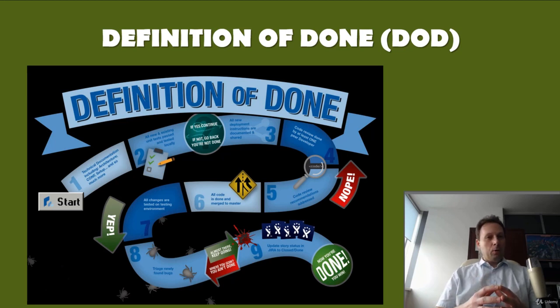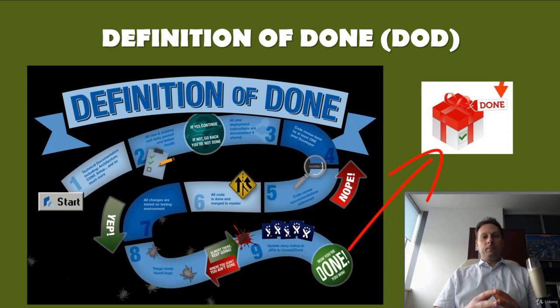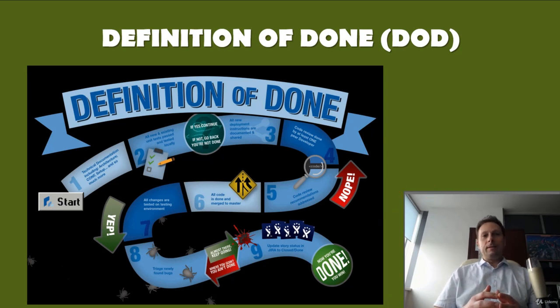So the moment a product backlog item meets the definition of done, an increment is born. The definition of done represents the organization's formal definition of quality for product backlog items. If the definition of done for an increment is a part of organizational standards, all Scrum teams should follow it as a minimum. And if it is not an organizational standard, the Scrum team must create a definition of done appropriately for the product. Definition of done is the commitment contained within the increment artifact.